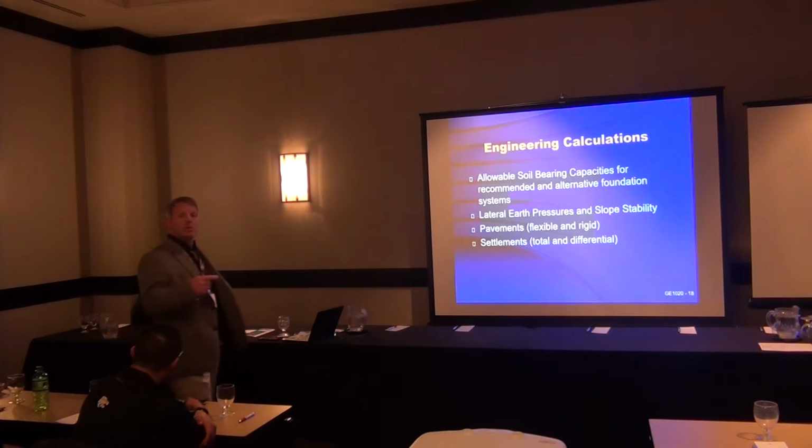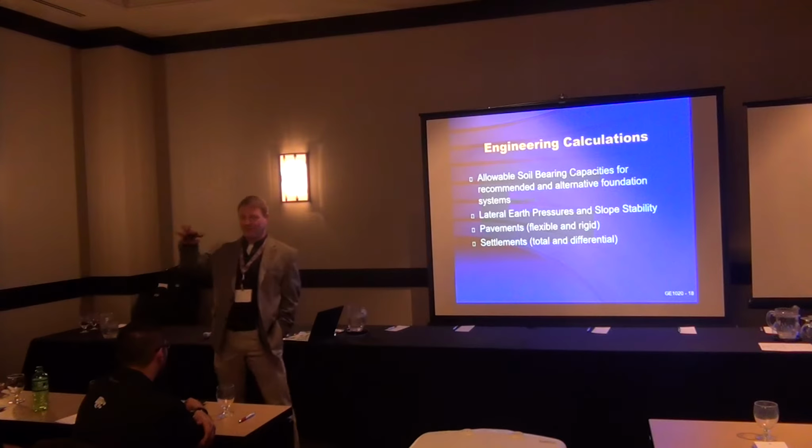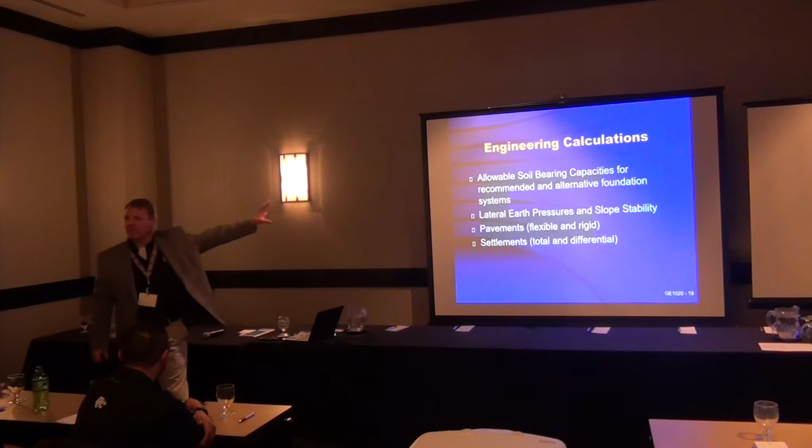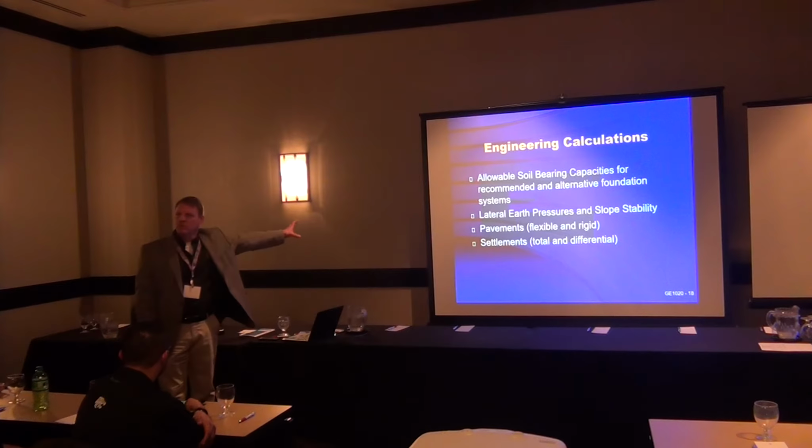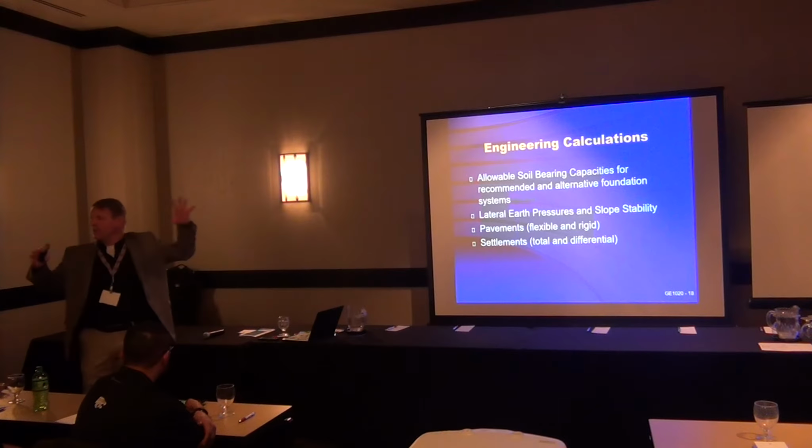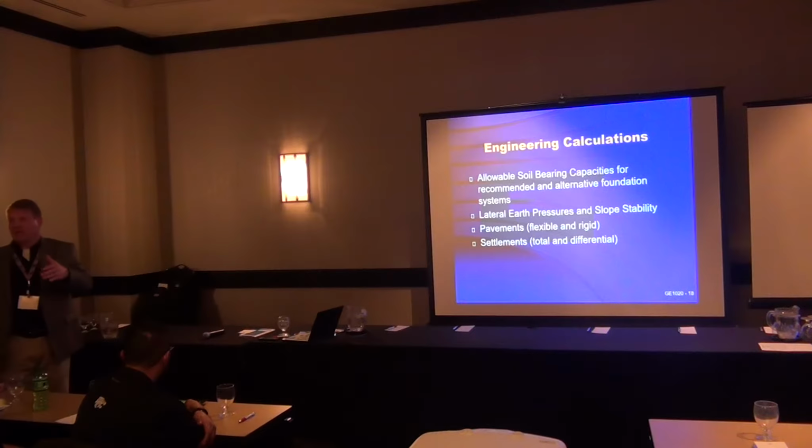So what should happen is you have a geotechnical report done prior to the start of construction. And then that same company or a similar company comes out during construction and looks at your foundation excavation and verifies that what you have exposed is the same as what was in the geotechnical report.